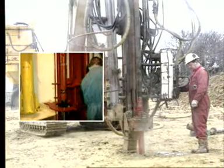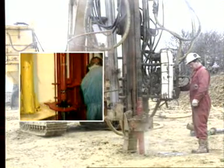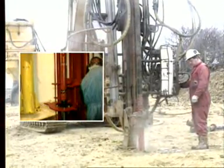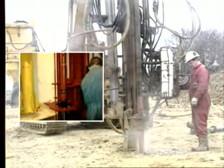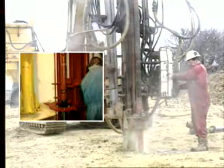All Halco hammers are checked on our own test rig, but for the first hour of use, a new hammer should be run with 50% more oil than normal and at a low air pressure. This running-in procedure is also needed when new components like a piston have been fitted to a used hammer.